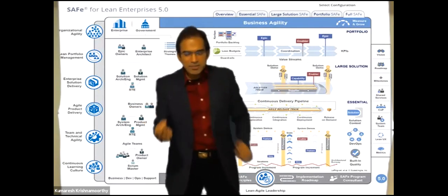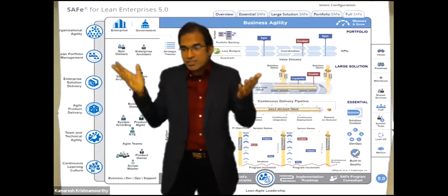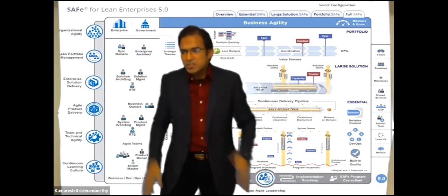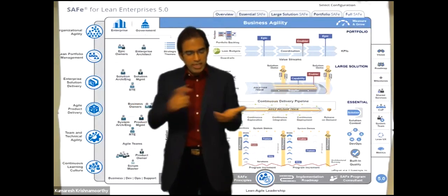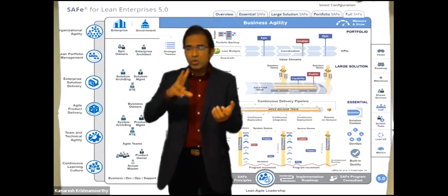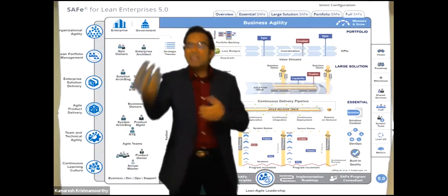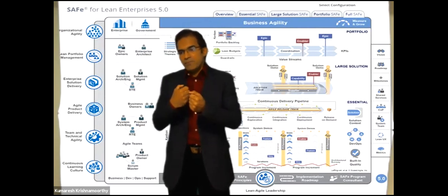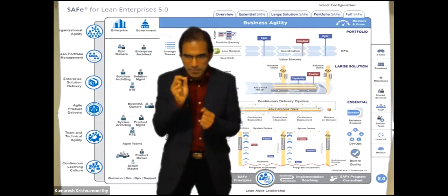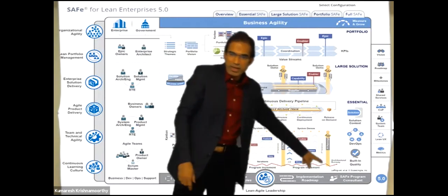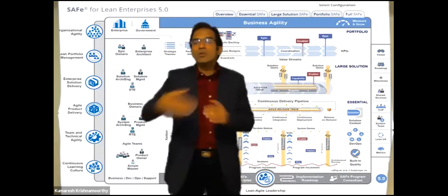So a lot of times in this situation, we say, oh, sorry, the architecture is already defined, the infrastructure is already laid, and any changes, we cannot support that. So either you compromise on the requirements, or you compromise on the design, or you have to change whatever you built. That is why there are two things here. The second part is that the architecture runway has to be there, but the architects should not commit to a design too far.